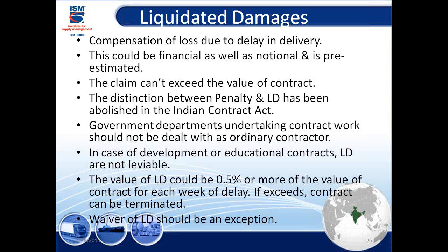And even if one government department is giving a contract to another public sector undertaking, no liquidated damages. Because within the government body, they think the money is coming from one pocket to another pocket. So the government cannot charge liquidated damages from one government body to another government body, but certainly from the private sector. Normally the guidelines are, it is left to you, your past practices around.